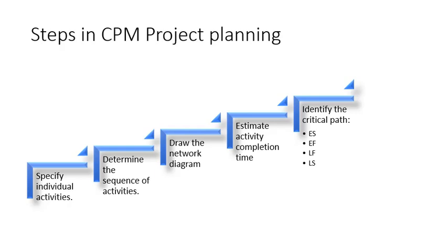Continuing with the next step, that is updating the CPM diagram from time to time. So as the project grows, the actual task completion time will be identified and the network diagram can be updated to incorporate this information. If the project requirements change, a new critical path may emerge and structural changes may be made in the network.